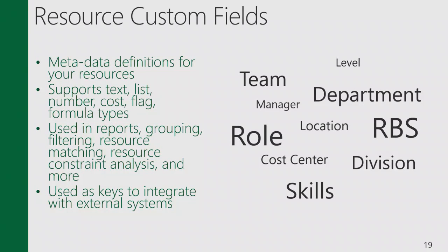Another thing that's important to note is the last bullet point here: you also would use custom fields to integrate with other systems. Whether you need to integrate with an ERP system or HR system, a homegrown solution. If you want to transfer data from a homegrown timesheet system to Project Server, you would need to know the resource ID in that homegrown system maps to the resource ID in Project Server.